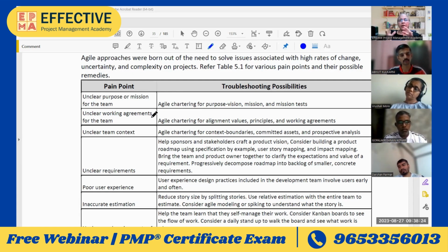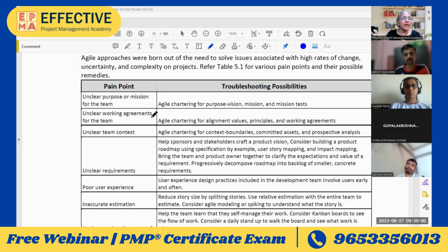When a particular team member faces any problem, it can be a technical problem, it can be a logical problem, it can be something that a team member has not understood clearly, it can be a risk identification or risk management problem, any problem. I'm facing a problem and I'm not able to resolve it, so I need to call other team members to help me. All the team will come here. Iteration size is 10 working days, and if my team spends one full day on solving my problem, that is going to be expensive for the team. So the team will not do that.